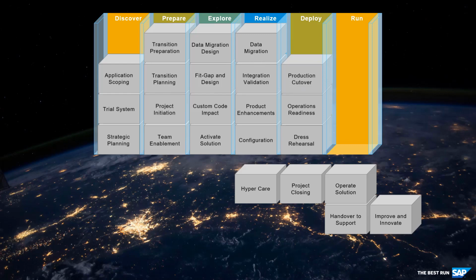The purpose of the production cutover is to perform the cutover to the production software as defined in the cutover plan and go live. At this point, the organizational, business, functional, technical, and system aspects of the project are ready to be used in production. SAP supports this important step with the SAP Going Live Support Service. This service component is based on a standardized method to support critical situations during production cutover. SAP experts contribute their knowledge and expertise remotely to minimize the risks for the go-live.